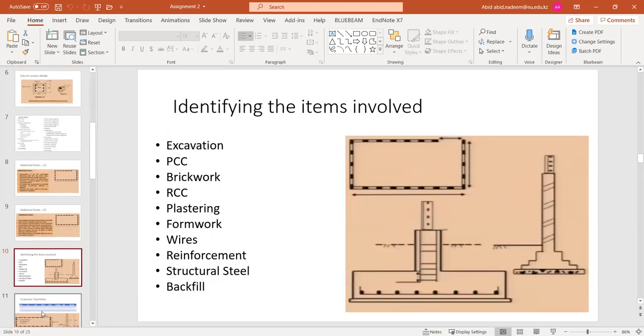I have a question. Yes. For backfill calculation, can we just calculate, for example, first the excavation, then the concrete amount and brick amount underground, then for backfill, just subtract these values? Yeah, this is the normal practice. Okay, thanks. That is what I have just said: first the full amount, and minus the deduction.